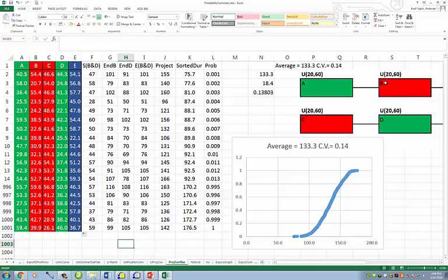The start of B and D needs both A and C to be completed, because B technically depends on A, and as far as the resource is concerned, it also depends on C. D technically depends on C, and for resource planning, it also depends on A, because we only have one resource green and one resource red. Okay, let's see when both A and C are completed.